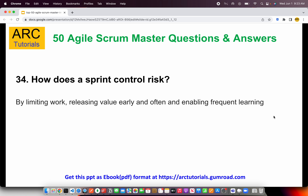How does a sprint control risk? When you limit work, you release value early, which means you get early feedback. When you get early feedback, you can improve and fix any defects or issues noticed. Hence, the risk of the overall end product goes down. Quality becomes high because iterations allow us to find issues early on in the product development stage.